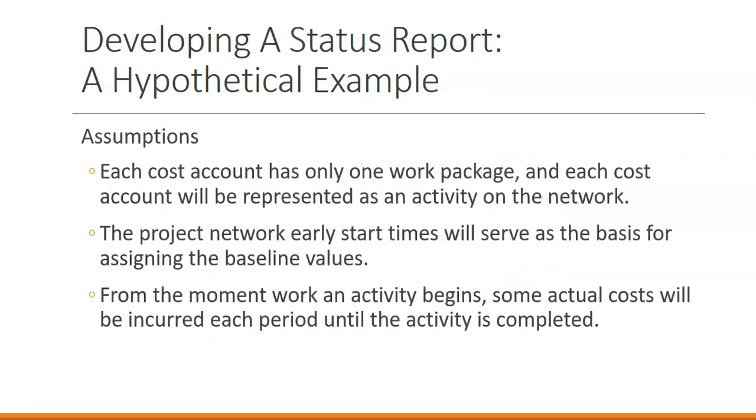When we're creating a status report to update the people that we need to update, we need to make some assumptions. So one of the assumptions is that each cost account has only one work package, and each cost account is represented as a single activity on the network. Another assumption is that our project network early start times are our basis for assigning our baseline values. And from the moment work on an activity begins, some actual costs will be incurred each period until the activity is